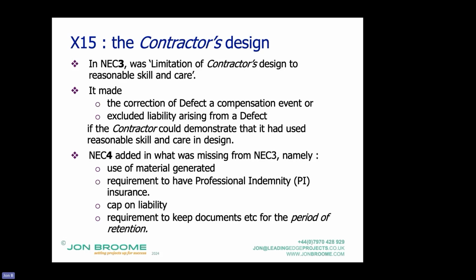So that's typically 12 years, because typically when we sign a contract in England and Wales and Northern Ireland, it's a 12-year limit from completion when people can sue us, if you like. In Scotland, it's 5 and 10 years. All right. When NEC4 came out and people started seeing period of retention of 12 years in it, you got people going, retention for 12 years? No way, I'm not signing that. And you had to sort of reassure them it's the documents that are being retained.